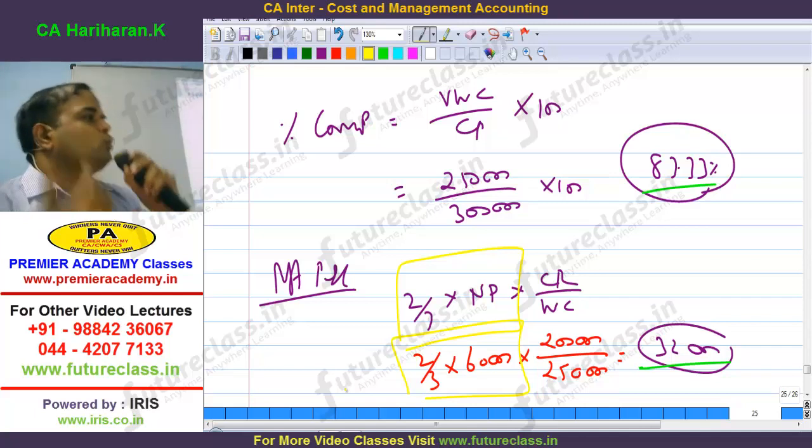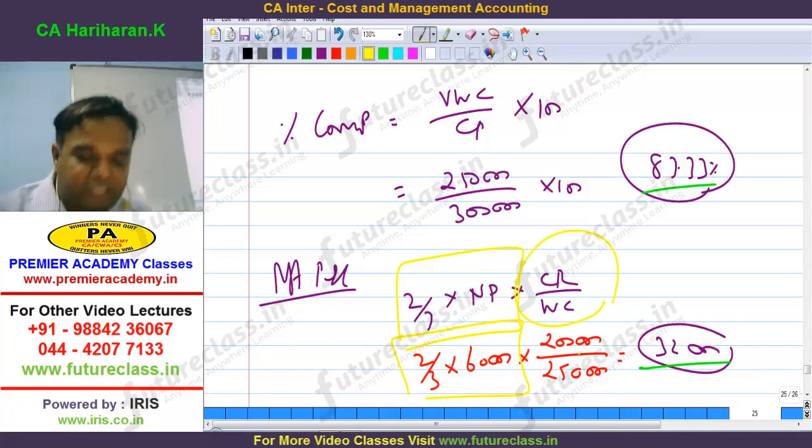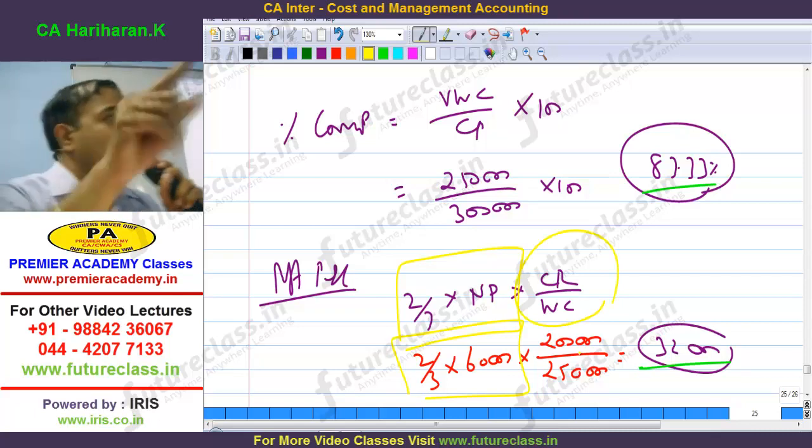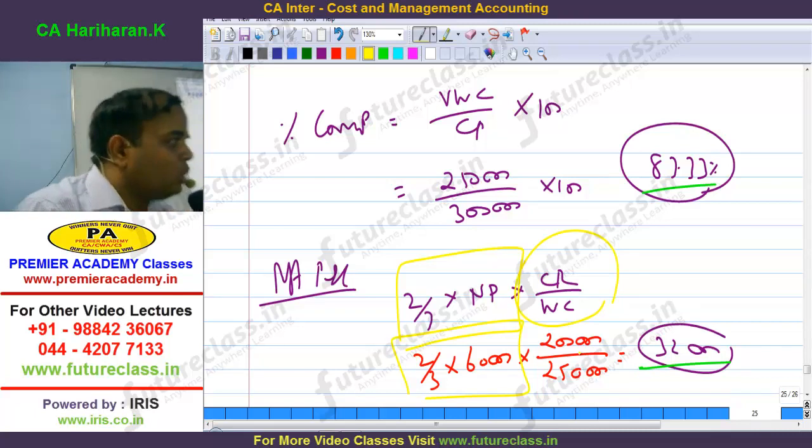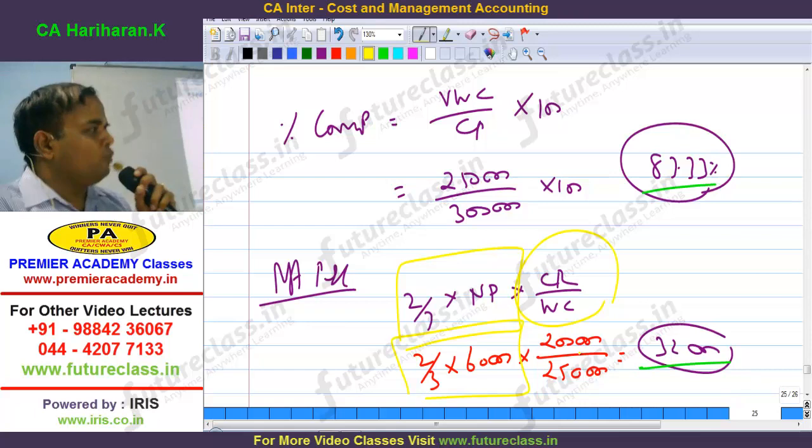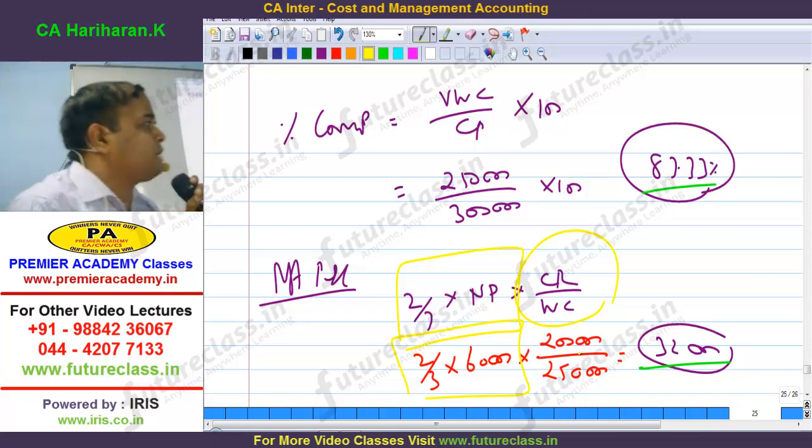Notional profit full cannot be taken. 2/3, 1/3 we can keep. Again, one more condition, cash issued to be work certificates are. Next logic for the same. Are you able to appreciate the logic or not? 2/3, 1/3 we can keep, right, as per the rules. You say we should not take it fully. Partly we need not take. 2/3 is still partly only, no?